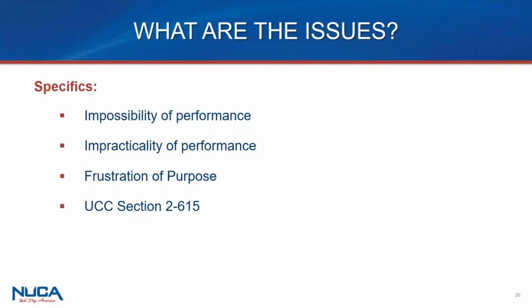This event has to not be anything that you assume could have happened under the contract. It's got to be unforeseen. It can't be something that you thought about, contemplated, and took a business risk on. It can't be your fault. You can't cause the fault, right? So if you cause a delay to the project and you go into a different time period of performance and now everything's more costly, that's not going to work. It can't be your fault.